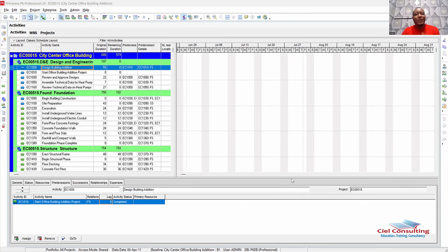And obviously, to be able to carry out all of these things or to be able to deliver all of these projects, you would need a project plan or a project schedule. And that's part of the reason why DCMA is very important. So to make sure that projects are delivered on budget as well as within schedule and also in line with quality expectation, DCMA came up with 14 points, which of course is now referred to as DCMA 14. So these are more like a 14-point schedule assessment. And this schedule assessment, of course, is used as a standard way to check if a contractor's project is reliable and also realistic.